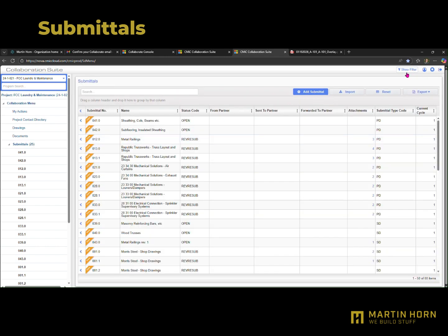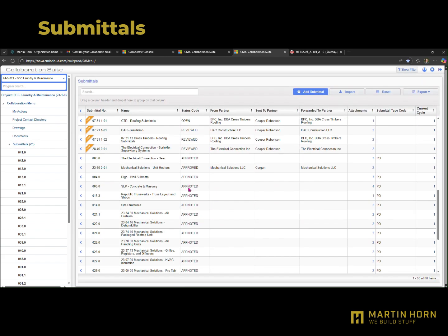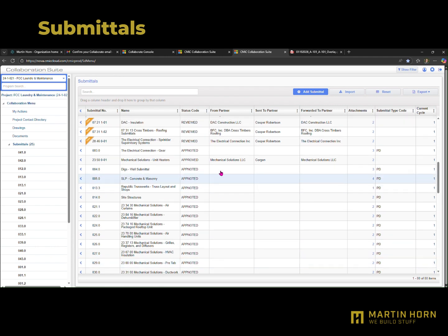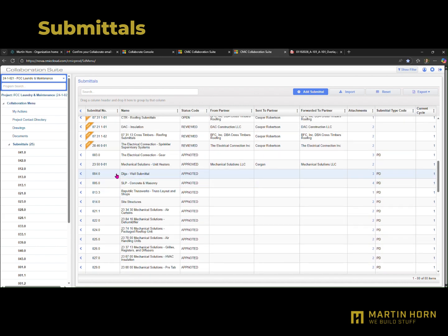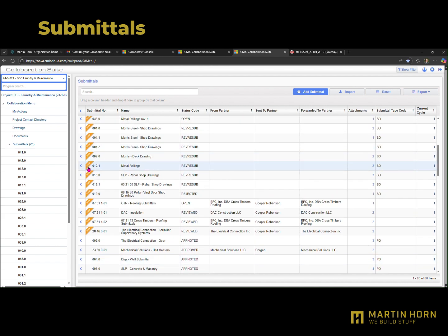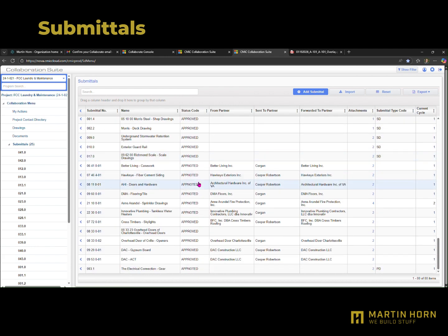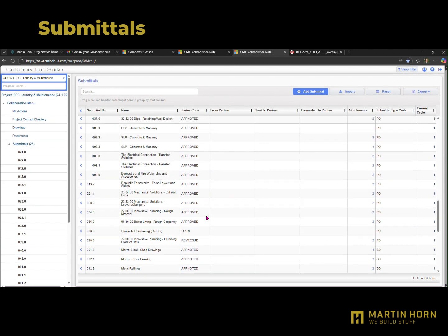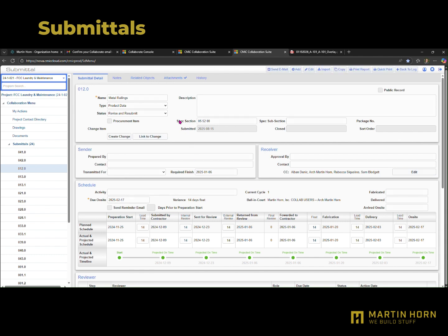Reopen the filter and click Save as Default. This ensures that any time you open the screen moving forward in the project, the filter will remain cleared and will not impact what you see. On the left-hand side of the screen, you will see some submittals that have an orange flag next to them. This lets you know that this is a new record and you have not seen it yet. To view a submittal, click on the record.